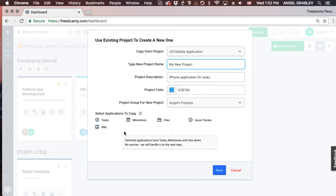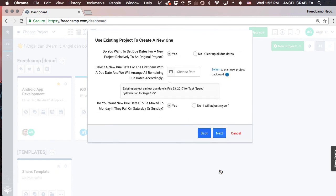Now, choose which application's content you want to copy over. You can select a new relative date to adjust all existing due dates against, or clear all due dates. Additionally, you can choose whether the set date is the starting or ending point to align due date items against.